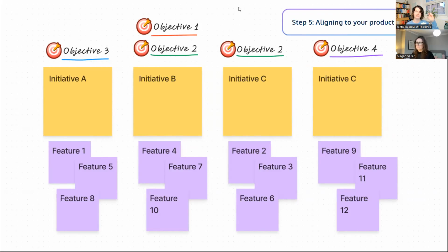Your objectives go at the top of your initiatives and are highlighted. So it's really clear as to whether you're working on one objective now or another objective later, or multiple things at the same time. Any initiative can have multiple objectives. You probably don't want more than 2 or 3, because beyond that, you might realize that either your objectives aren't separated enough or your initiatives are still too grouped up. So if you're finding that, then break the initiative up and say, this is the one we're going to do to increase revenue, and this is the one we're going to do to decrease churn, if those are your objectives.